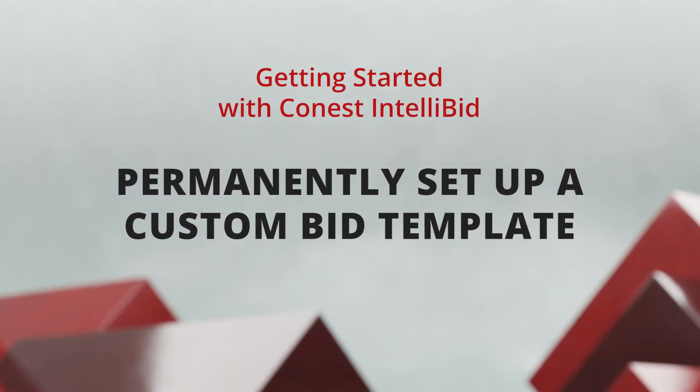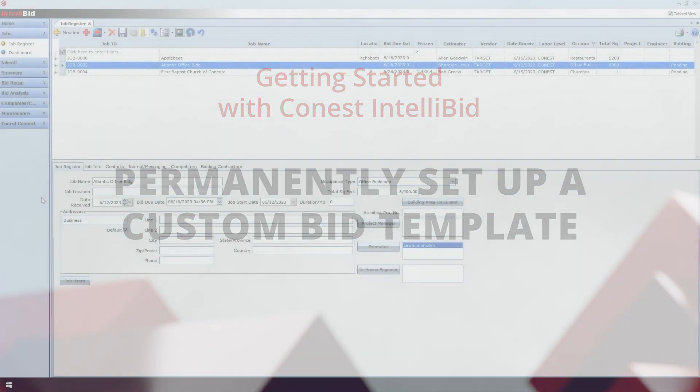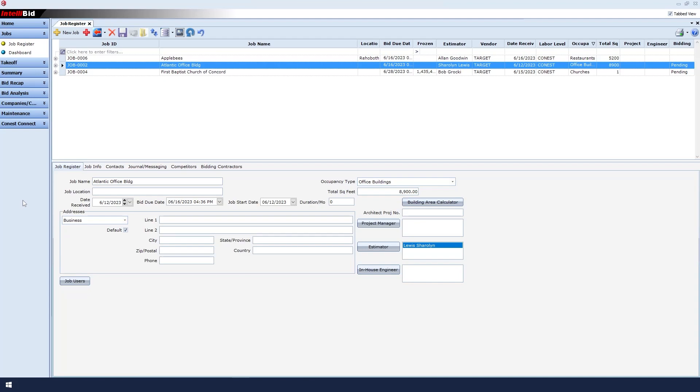Permanently set up a custom bid template. By using custom bid templates, I can save a ton of time. I can permanently set up things like my bid rate, burden, overhead, and profit. By doing this, these values will appear in any new bid that I create, saving me a ton of time.